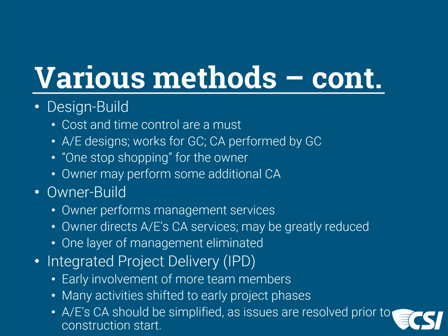And I'll add one here as I asked Matthew if there are any questions. One of the things that has changed in North Carolina is we have a public-private partnership opportunity now as another delivery method where private money and funding and perhaps even land are constructed and leased by a public entity where that public entity involves occupancy of a facility for a long-term period of time.